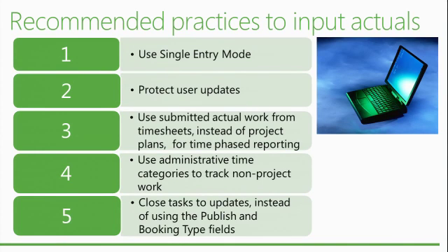Just a quick question on the administrative time. How much ability do you have to classify those? Can you make them anything you want, and are those all non-project categories? Are they set in stone? No, some of them are default. Some others can be created by you. You can add as many as you want. And you have an additional field called classification that you can use to categorize the admin time further, which is non-project time, and I think that is not an assignment.